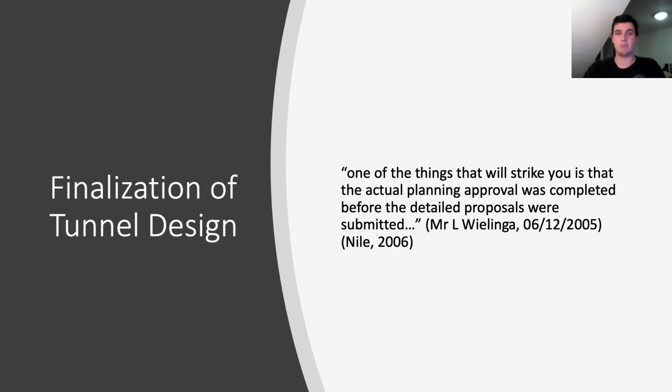A major factor that could be improved was to finalize the project design before the environmental impact statements are completed. As stated by the RTA, one of the things that will strike you is that the actual planning approval was completed before the detailed proposals were submitted.